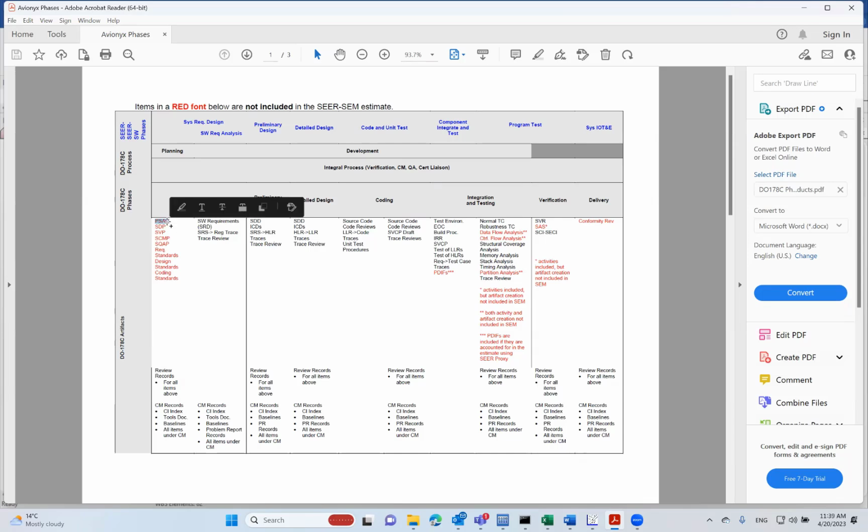So this document usually requires some effort, but development plan, verification plan, configuration management plan, quality assurance plan, and all the standards, most of the time, organizations that are in DO-178 have generic versions of these that can be reused across projects.